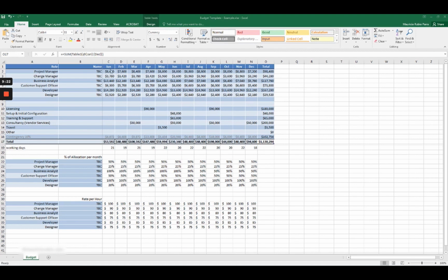Because these numbers at this stage, when you're in the discovery phase, or in your planning phase and you're doing your initial budget, this is all a forecast, right? It's a baseline. It's what you think you're going to spend. I think I'm going to spend 1.1 million with the information I have right now and with the assumptions I'm making right now. I could actually end up spending less than that or more than that. And that's going to depend on the actuals, the number of hours people actually work on the project. If something that you hadn't planned for comes up, but your goal as a project manager is to try to hit this number. And this number is key.